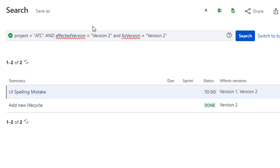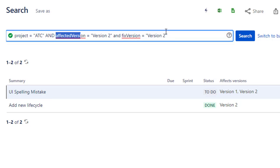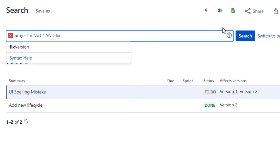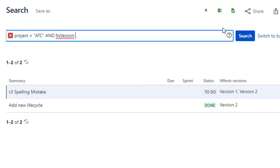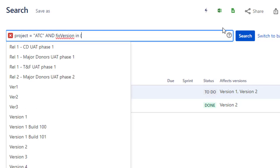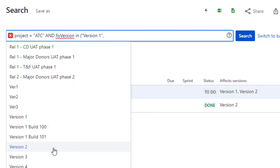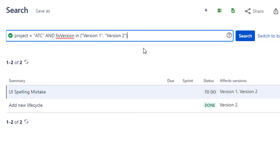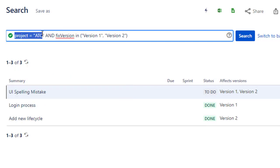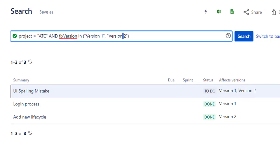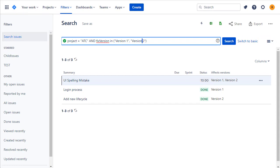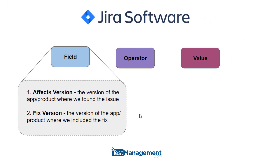If you want to find issues in multiple versions, you can use the IN clause — for example, fix version in a list of versions such as version one and version two. This searches for issues in that project where the fixed version can be either version one or version two.